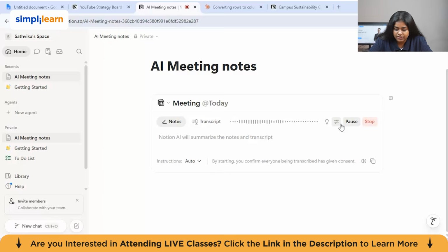Regarding risk, we identified three. First, there is a risk of low student engagement. Second, budget constraints may affect the launch event. Third, delays in department approvals could push our timeline. Our deadlines are campaign poster due May 25th, social media content due May 28th, and full campaign launch on June 1st. That covers everything for today. Meeting adjourned.